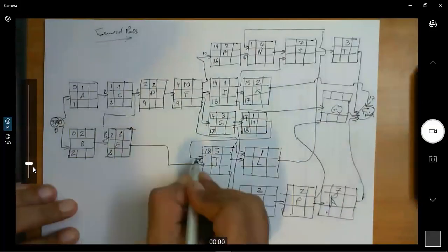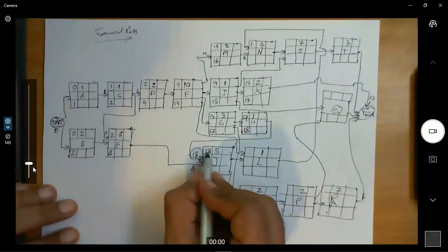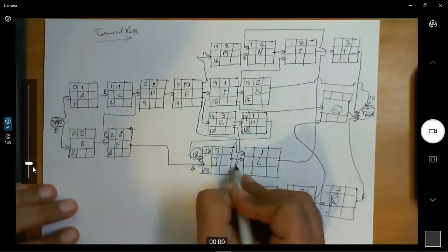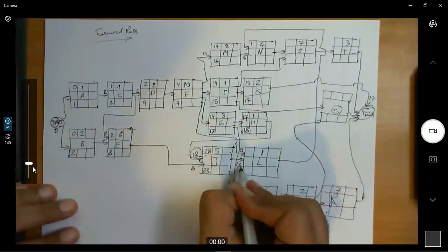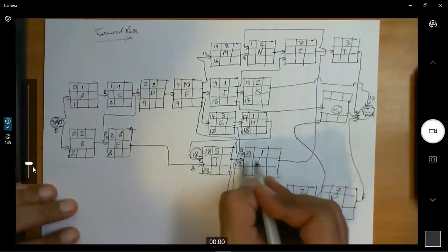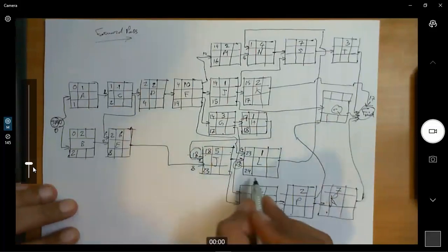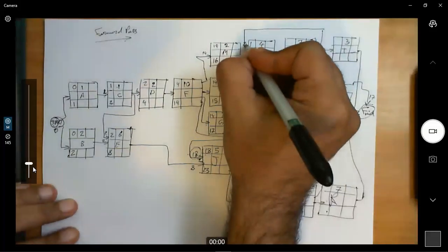And here, this is 18 and here is 8. Okay, of course we take the higher value. So it's 18. 18 plus 5, that's 23. So we have here 23. And here we have from this arrow 14, we take of course the 23. 23 plus 1, 24. Okay, then this arrow, follow it, 24.